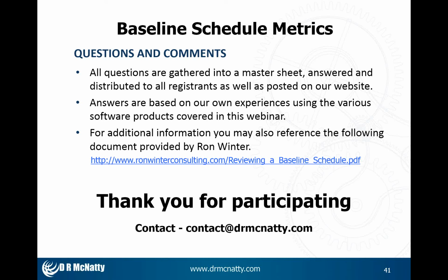There are best practices, and I would refer you to the AACE website, not best practice, but recommended practices of how you might rebaseline. One of the things that happens often is that additional detail is added. If a summary level was put in place in the original baseline, then I can add activities underneath it. And the tip that I would suggest is, let's say I have activity A400 and it spans 3 months, way out into the future.